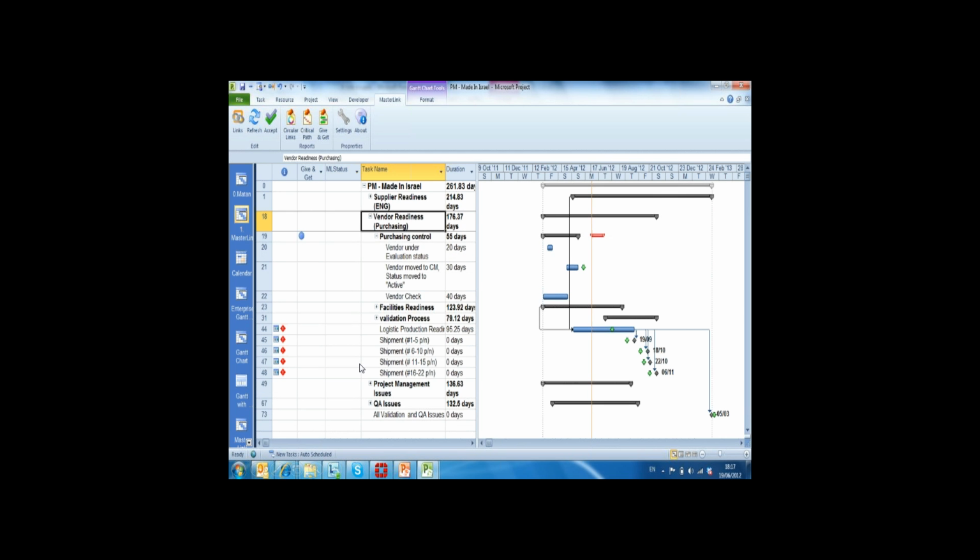But if I want the team manager to actually plan this work and allocate people to it, what the project manager needs to do is take this work package and send it to the project file, or work package file, of the team manager. Here we're using, and again, this is just an example, a tool by Matan called MasterLink. But again, focus here on the process. I have a project file both for the project manager and for each team manager, and a project file for each project he's working on.